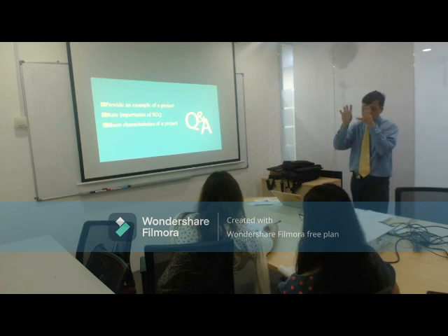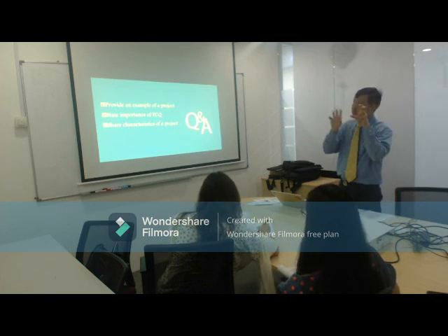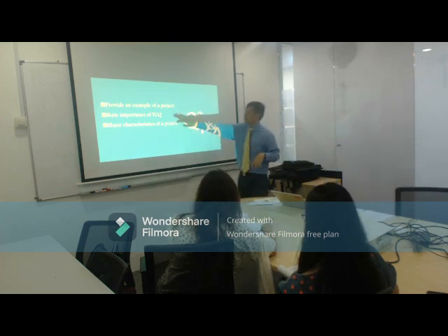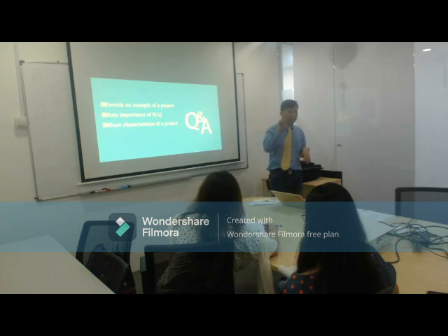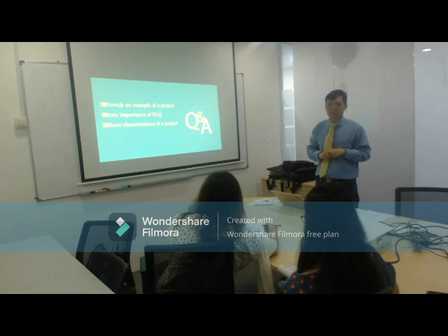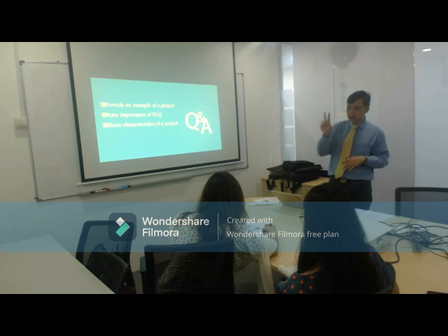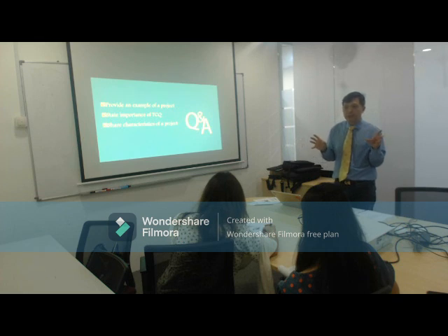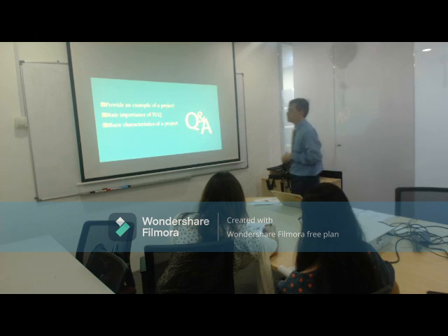That's where if you draw your TCQ diagram, then you can see where the important areas are. Now, why I mentioned TCQ is that normally for TCQ, you always have 2 that are important, and you always sacrifice 1. Yeah, in any project, it is very common that we concentrate on 2 and sacrifice 1. So the management have to agree on which one is the one to sacrifice. Once it's agreed at the beginning of the project, everyone agrees on it, then they will just proceed with it. So it's easier.